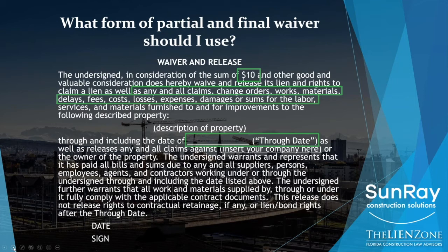Now, if they wrote $10 and you're expecting 50 and they gave you 30 and you signed this release that said $10, the judge more likely than not is going to say, well, I guess you decided to take 30 instead of 50. And this release is not conditioned on 50. It says $10 and you got 30. That's a lot more than $10. So I'm going to make sure that you're bound by it.